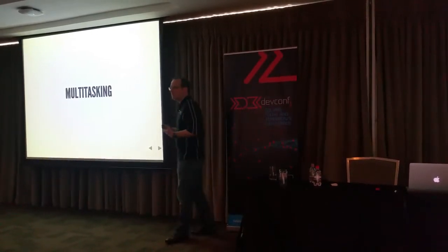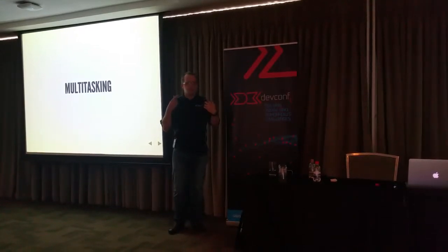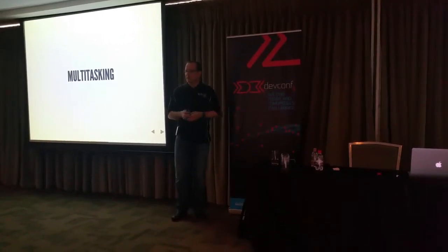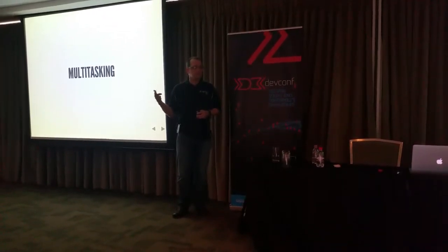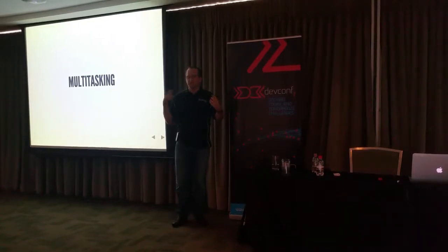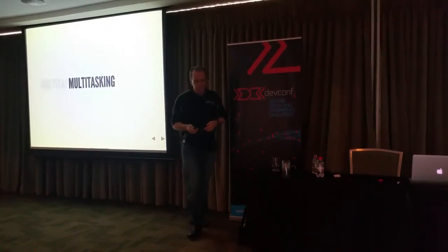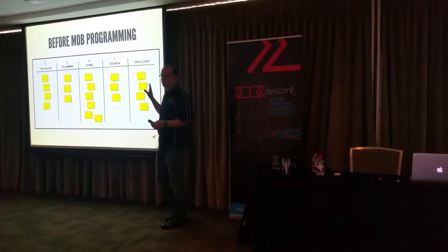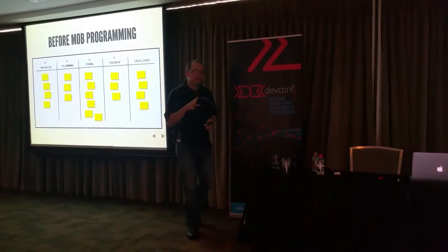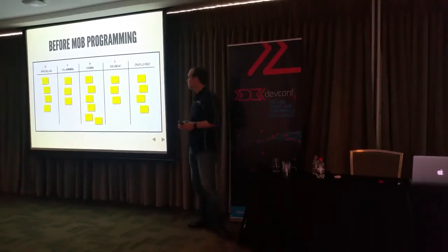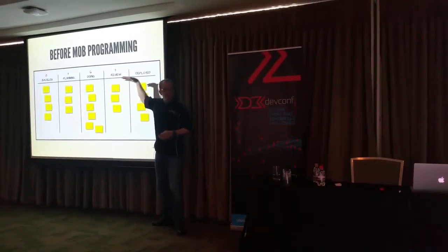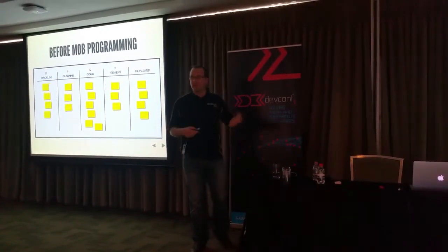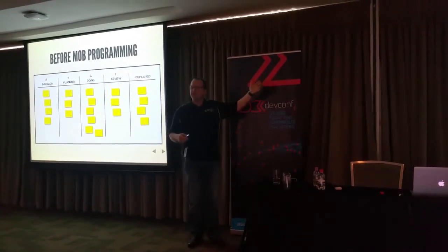Let's talk about multitasking. We know that when we multitask, it can cost us. If you're doing a switch in thoughts, it can cost you anywhere from 15 minutes plus. That's what studies show. You can imagine that with multiple context switches within a day, you're losing potentially hours of your day just trying to get into the right focus. A fundamental concept of Kanban is to reduce work in progress, because they understand that context switches are expensive. In Kanban you'll see that they write numbers up above each swim lane, and the idea is that you're not allowed to pull work items in that exceed that number. So if you're in planning, you can't have more than 3 items that you're working on in planning, or whatever number you decide is appropriate for your team.